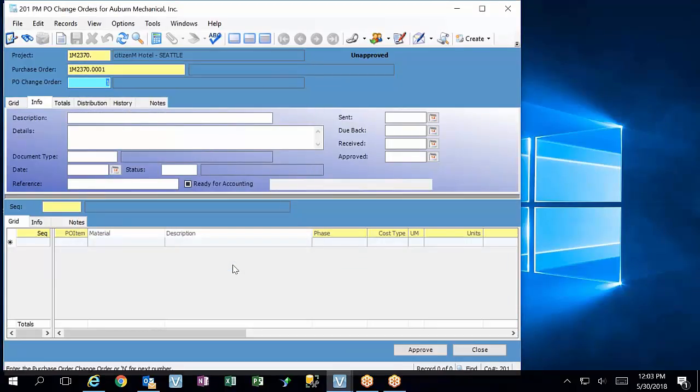Procedurally, I've never done a purchase order change order. What do you typically do when a purchase order needs to be adjusted? So say it's the same Marriott example: the Marriott Stonebridge would have added an extra floor after construction, and we already issued a PO to AirTech, and we needed to buy 12 more heat pumps. Would you have just written a separate purchase order? Either written a separate order, or sometimes I've just gone in and revised it, changed the PO, and left the price the same.